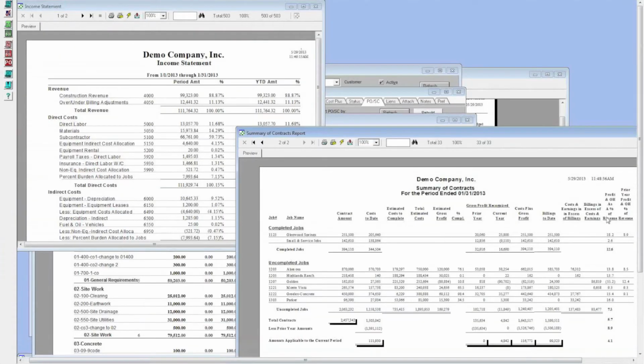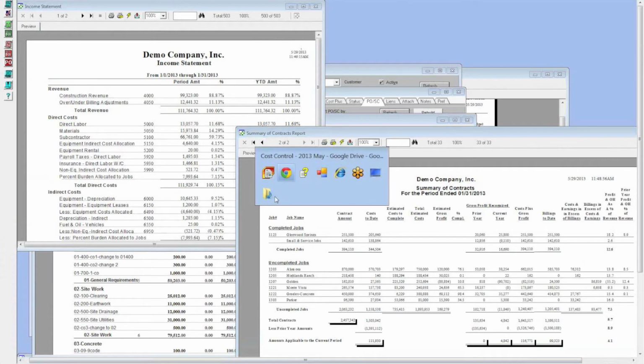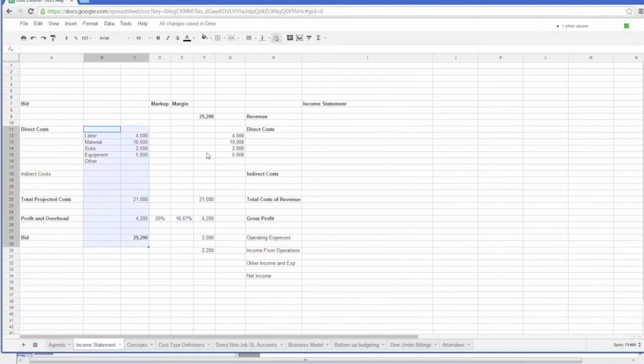And when that's done, this column will say cost, or it'll say revenue. So a percentage of revenue is margin, and a percentage of cost is markup. Markup is what you see in the estimating process. In the accounting process, you see margin as an industry standard. Okay, just to make it hard, right?